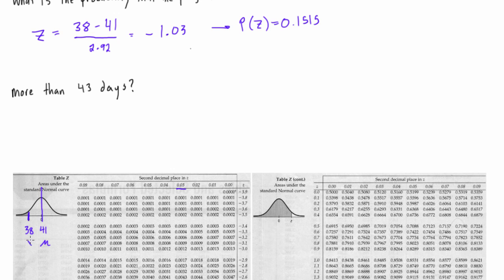And this is our x value. This is saying that the z-score table will always give you the probability of landing in a shaded region, no matter which one you're using. So now we're saying we have a 15% chance of landing here in the shaded region, and this shaded region is anything that's less than 38.